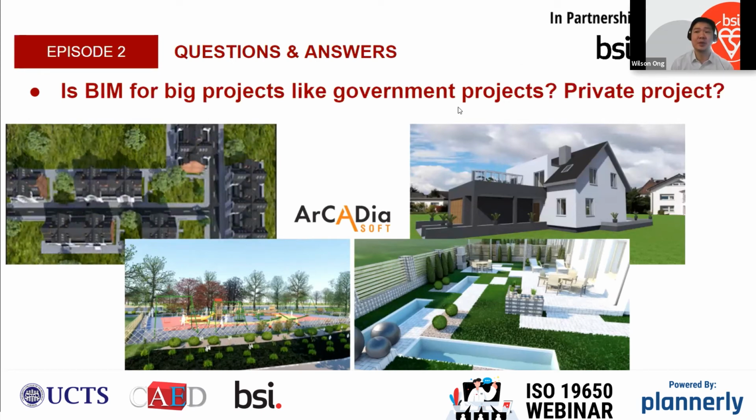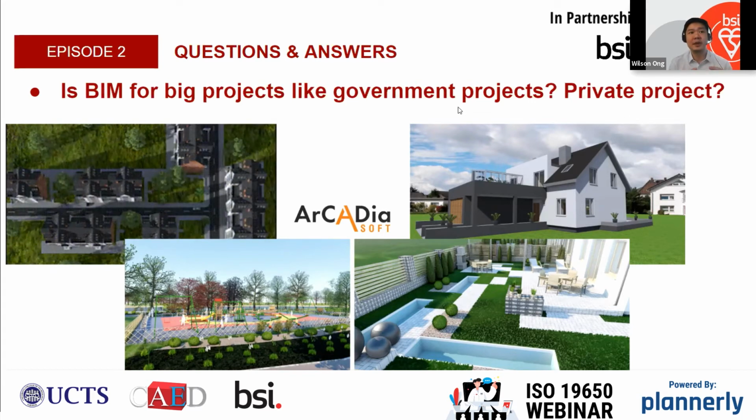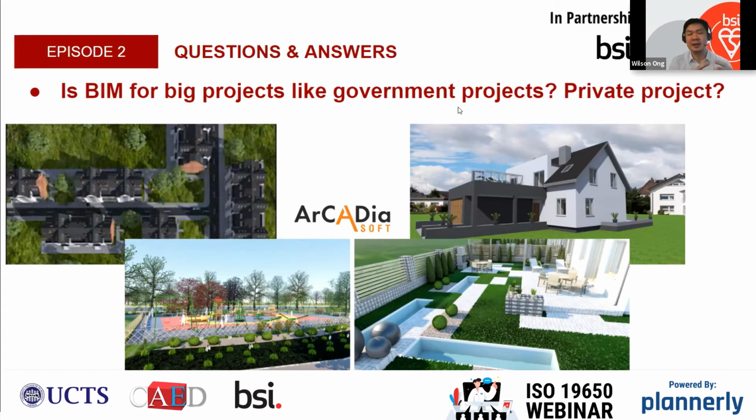Normally when we do things the first time, there's a lot we can improve. So most private companies choose a pilot project, something manageable and very small scale, and they test out their processes and methods. From there they see what can be improved, and taking the lessons learned, only then do they slowly scale it up.